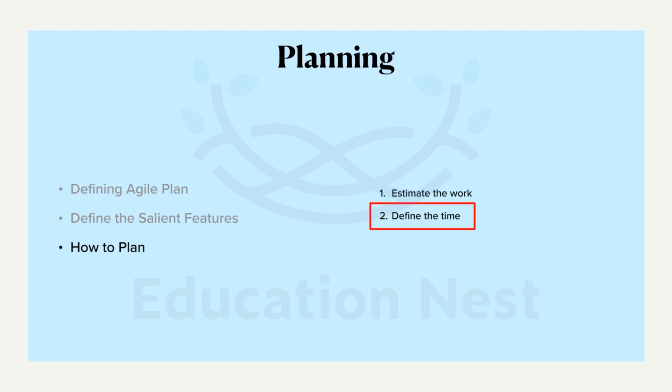So what happens here is that it's a human tendency. Even the agile book talks about this, that if you are given 2 weeks to do a simple task, you are most probable to do it at the end of 2 weeks only. Even though this work can be done in just one day, if somebody tells you that okay, this work has to be done in 10 days, you as a stakeholder will tend to do it on the 10th day only, even if it is a one day work, right? So you won't do it today and then wait for the 9 days. So it's very rare to happen because we have other priorities all the time, right? So nobody is free, at least not in the organizations.